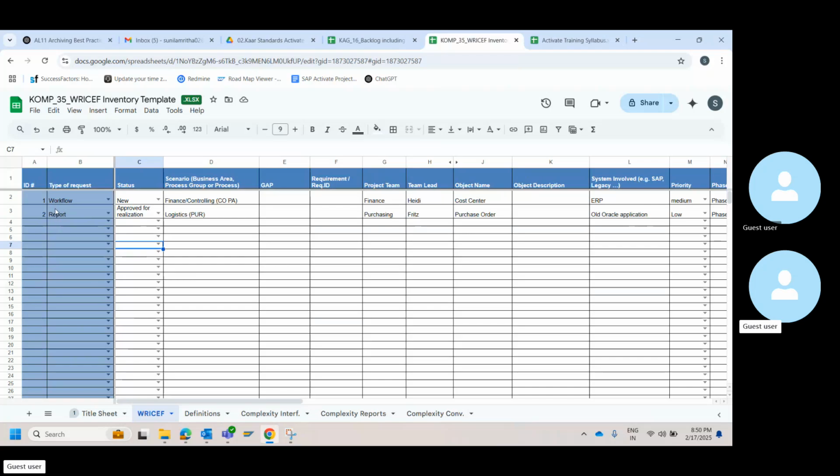So before go live, I will probably have to do all the configuration activities that I have listed down in the backlog. However, RICEFWs, I need not do everything. Based on the prioritized RICEFWs and the count that we agreed in the contract, I can deliver before go live. The rest I can deliver after go live. And this list keeps on adding as we move towards the project.